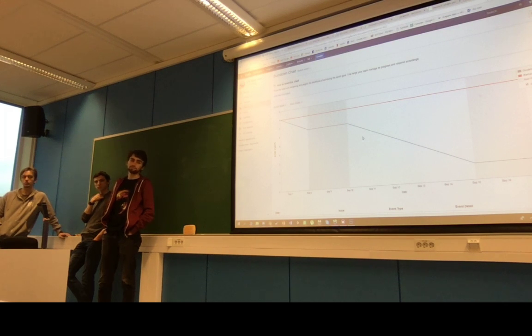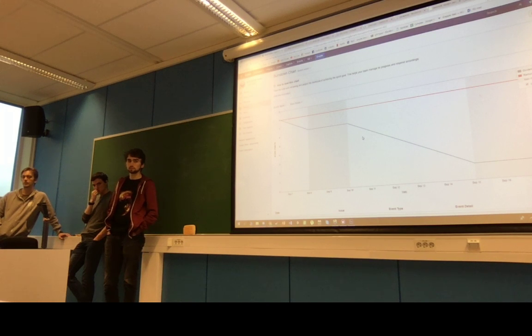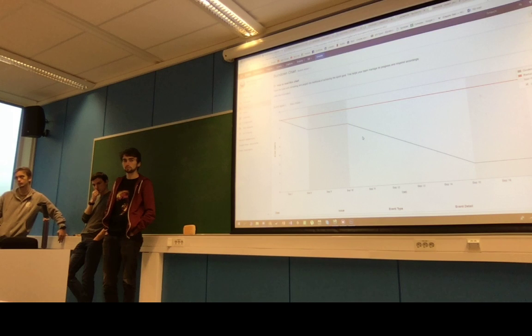Yeah, that's just the way we solved it. We estimated the stories and not the sub-issues. Yeah, you don't want the explosion of sub-issues either. You don't want every half an hour to be logged and committed and documented. I mean, one issue doesn't take half an hour because you have to factor in. Yeah, exactly. So there is some unit like 4 hours or 2 hours, which makes sense to keep documenting. If something is smaller than 2 hours, it gets merged with something bigger, right?